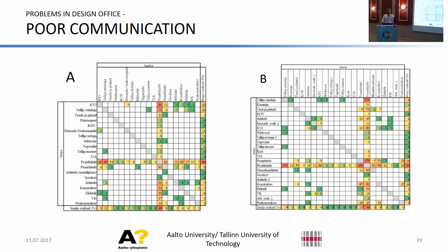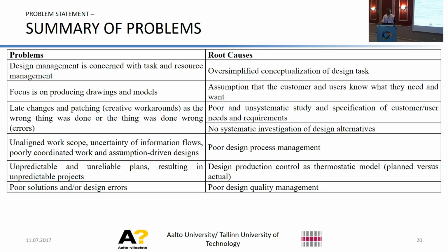What happens is that you have a project manager who has 6 or 7 projects. If he has to be a pigeon messenger in all of these projects, you can assume that he cannot actually focus on the content. He's just sharing and translating information. So there is no control over the process.